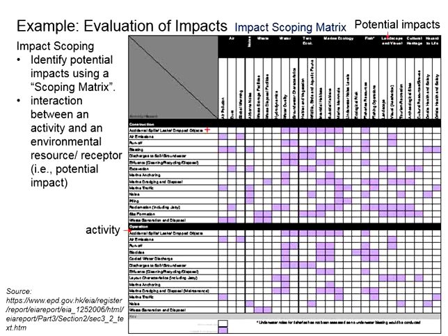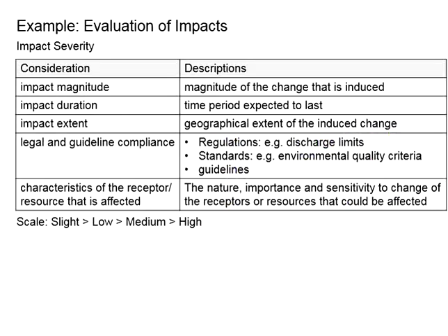Next, you will provide rating. At this stage, you are at the scoping stage. You only want to know whether the impacts are potentially associated with the project activities. There may be two classifications: no impacts and potential impacts, as demonstrated here. Next step, you are looking into the impact severities. You can provide a scale to indicate the severity of the impacts. Now, the number of levels depends on your preference.